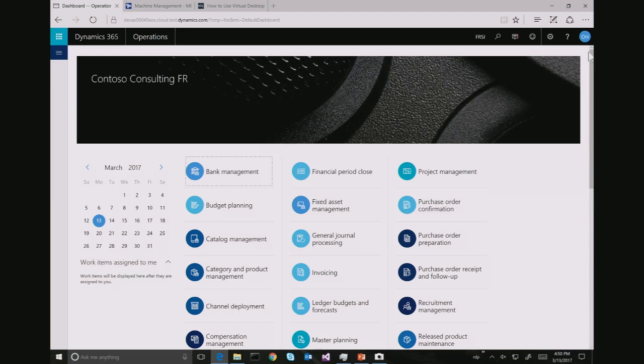Right. So just repeat the question for those of you that didn't hear. The first question was, do I need to be assigned to a project to be able to report time? The answer is no, you don't have to. And in that case, you'll use the default rates that are set up, non-resource specific rates.